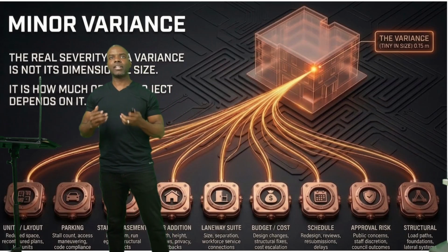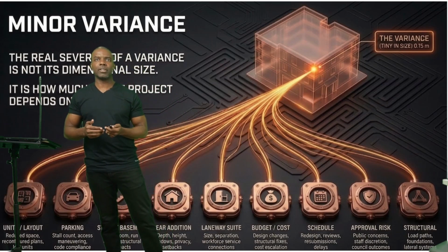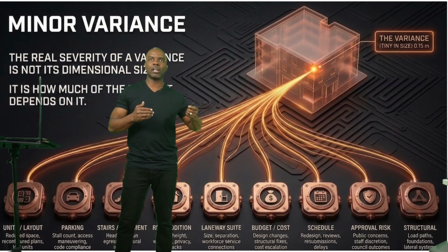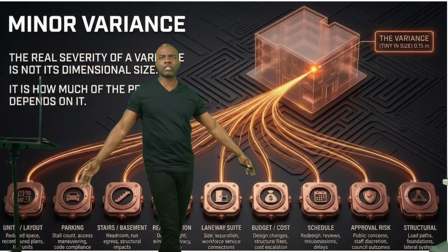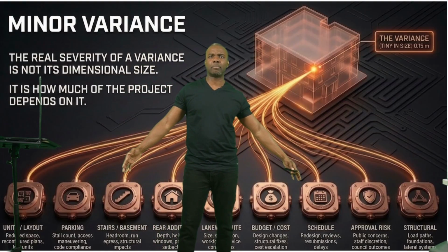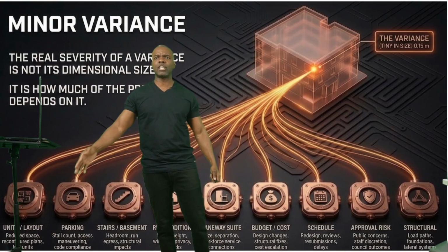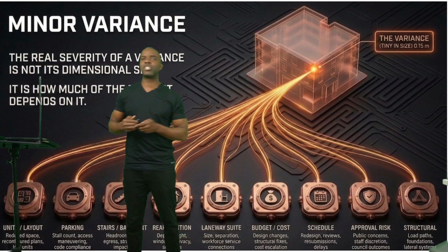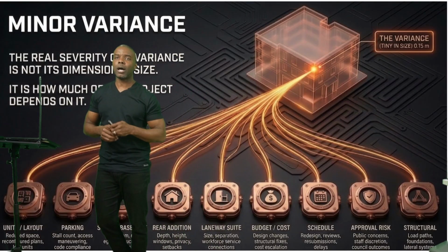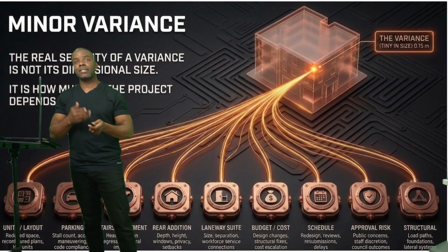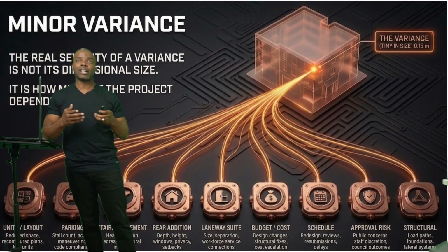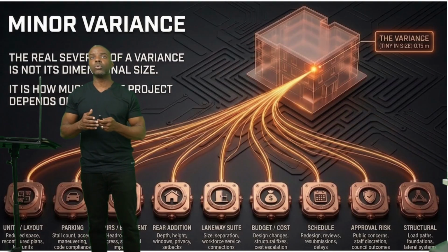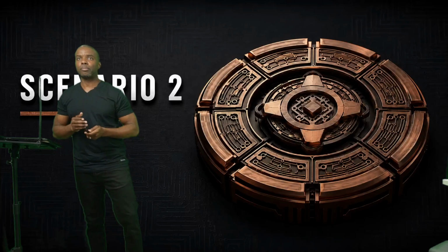Keep in mind that with a variance, you need to make sure you're really understanding the severity of it and the impact it has. As you can see just right below here, it can have parking impact, stairs impact, cost impact, schedule impact. This is so much different type of risk that can come from doing this type of variance. So keep that in mind as you progress through assessing your property.